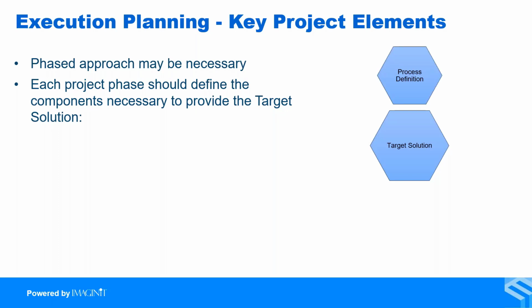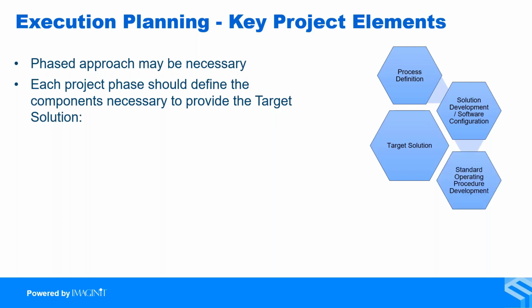In this example, if we are looking at, for example, a target solution of engineering service provider collaboration, we would start with process definition. What are the workflows that those engineering service providers are going to specifically interact with within our engineering team? Then we would focus on solution development and software configuration. How are we going to provide a solution? Which software components and how will they be configured to meet the needs of the users? We would then want to develop standard operating procedures.